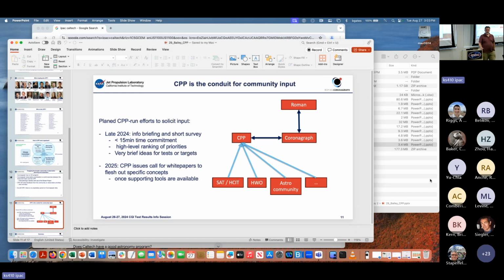And we had a 54-day TVAC. We didn't test contrast stability. We don't have spare hardware on most of our critical assemblies. We didn't do 2 TVAC tests. It still cost $450 million. And we still took a real long time. And we're still at an institution that is in deep trouble because a different project didn't pass KDP-B for cost.